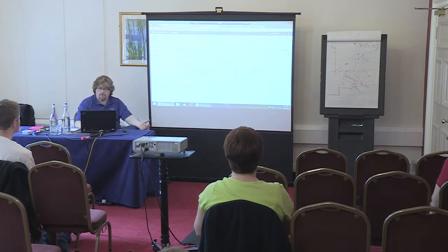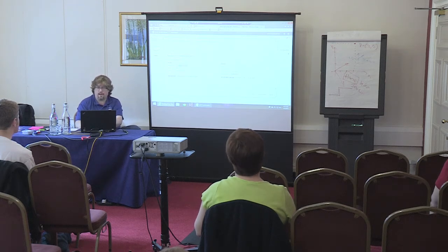Now, a few things to be aware. First of all, I spelled this wrong. So what I'll do is I'll come over here and double click, and I get the form. So I can say system. Okay, life is good. I can assign it to someone. I can specify the effort. And think about effort, this is just any measurement you want to use. Story points is a popular mechanism. So we'll say this is 10 story points, and we'll say the business value is, let's see, fast, 100. Very important. Save it. Okay, now you see the efforts show up.